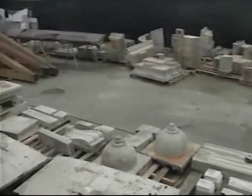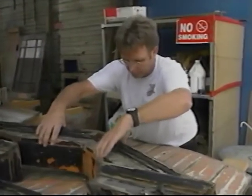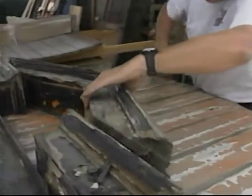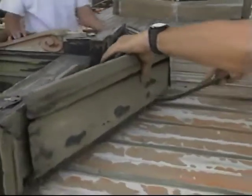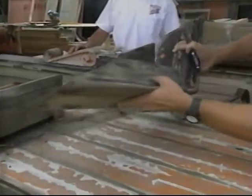We have retained as much of what we call historic fabric, the original wood, the cast concrete pieces, steel bars, you name it. It's our objective in terms of integrity to keep the original pieces and put them back in the building and only replace pieces that were missing or so deteriorated that we couldn't repair them. I can very confidently say that better than 90% of the station house and the cars and all the parts of the construction are original material.